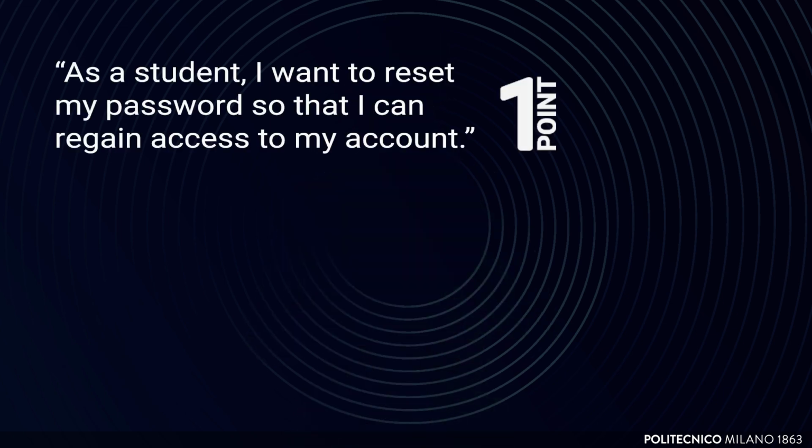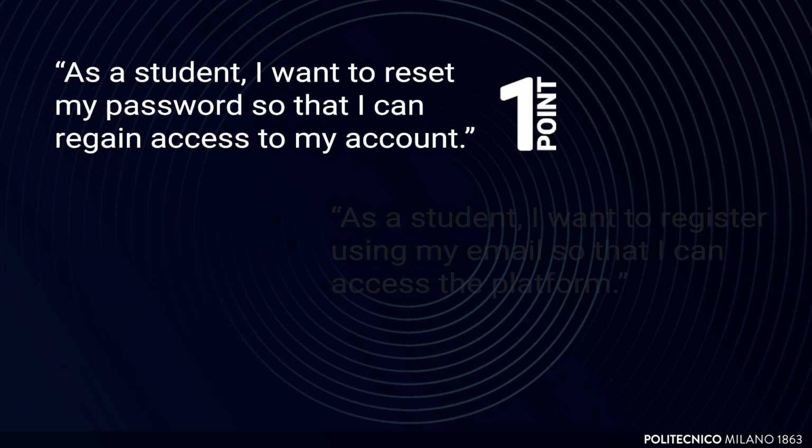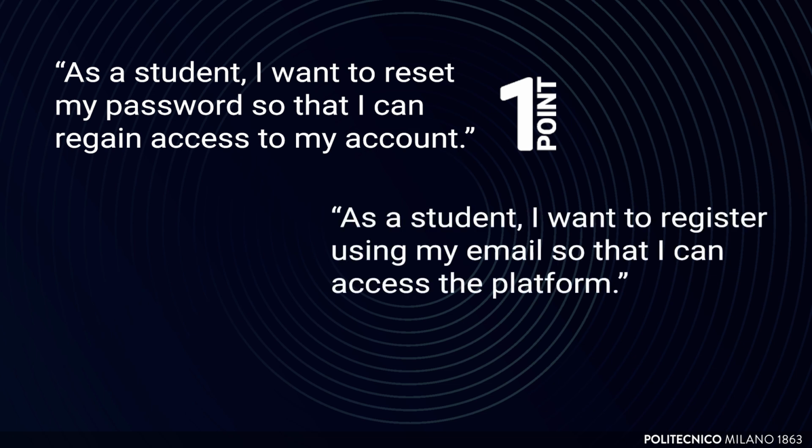For example, the team might ultimately agree that the registration story is more complex than the password reset story, but not significantly so, assigning it 3 points. This consensus is critical. It marks a shared commitment to treating these story points as the standard for all future comparisons, even though the developer who will take care of that story originally put 10.